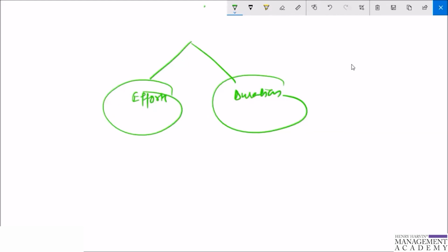Some amount of preliminary design discussion is necessary and appropriate when estimating. However, spending too much time on the design discussion sends the team too far up the accuracy effort curve. That might change over a period of time, right?